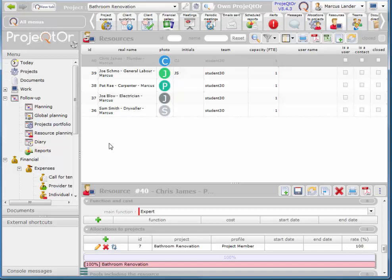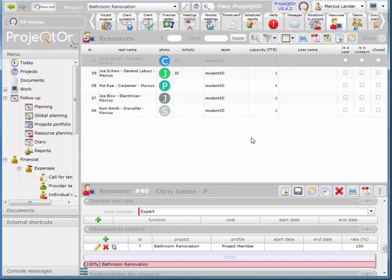So I'm going to choose one of the plumbing tasks and allocate him to that. Eventually I'll show you once I've finished here, I'll have every single task allocated to a resource.